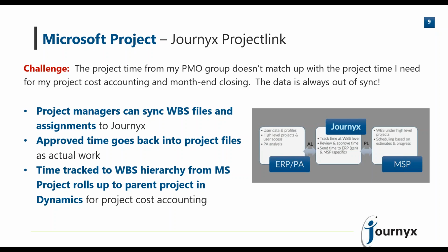Essentially what it allows you to do is it allows your PMO group to create and manage their project schedules, resources, and resource assignments in Microsoft Project and pull all of that data into Journyx. People can then track their time against those projects and tasks in Journyx. When that data gets approved, we're able then through Project Link to send that approved time back in as actual work into your Microsoft Project plans.